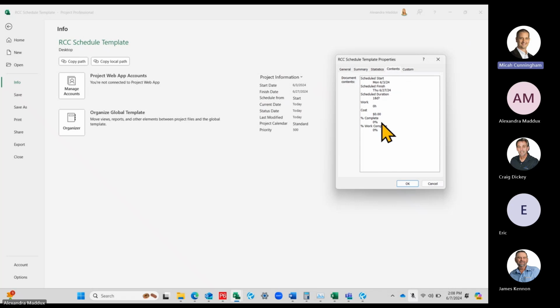And then percent complete is your overall based on duration of the project. And then work percent complete, that is based on your man hours. If you do have resource loading, which usually we won't get into that in Microsoft Project, because typically if resource loading is required, it's going to be in P6. So that's not something that we get into much with this. There are ways to do it if you guys want to learn that, but it's not common in Microsoft Project.